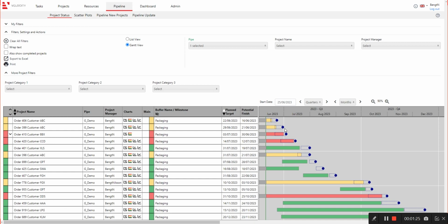Tasks with high uncertainty, like 5 to 15 days left, build a need for a bigger buffer or shock absorber like this. Other projects that have smaller variance will have smaller buffers looking like this.